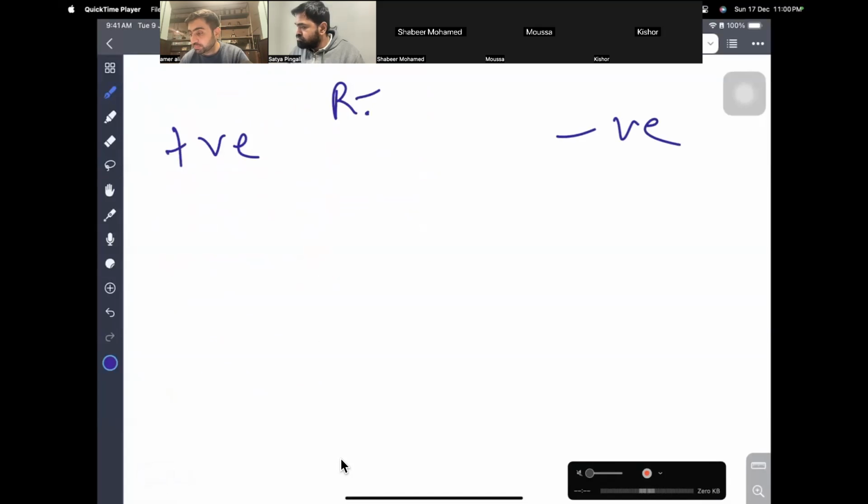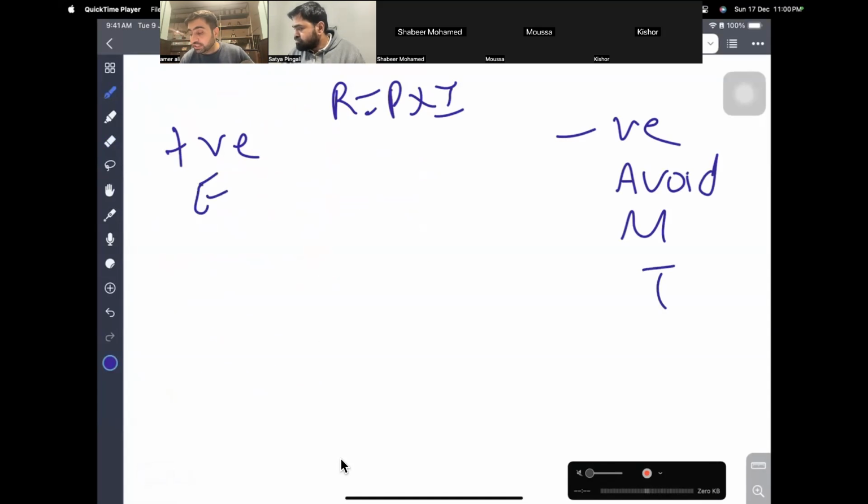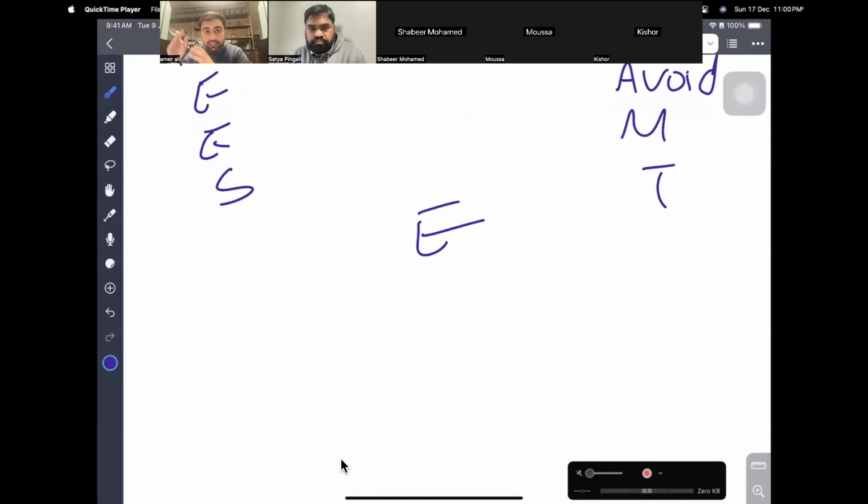We know that risk is probability times impact. We have avoid, mitigate, transfer for negative risks, and exploit, enhance, share for positive. And if the risk goes above our pay grade, we escalate that risk. This is the proactive risk strategy. You immediately handle that. The reactive is you identify the risk and you put a risk owner and risk trigger